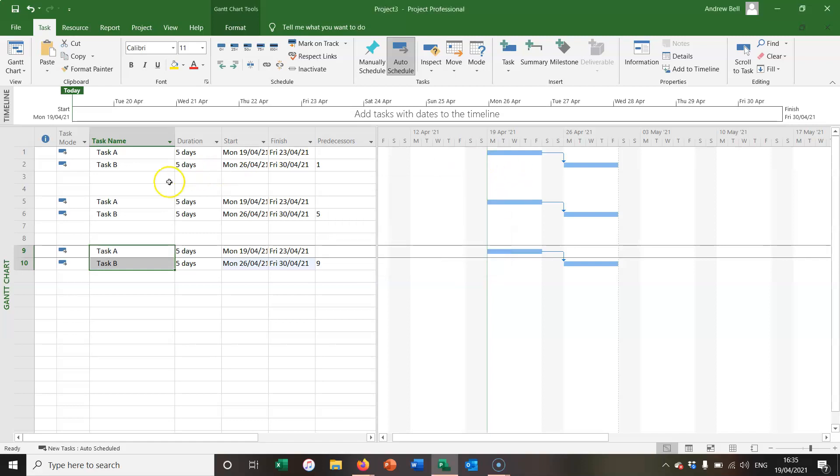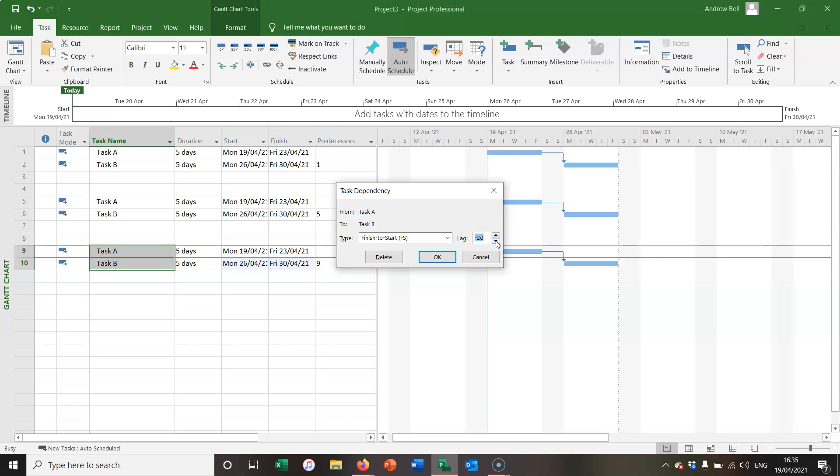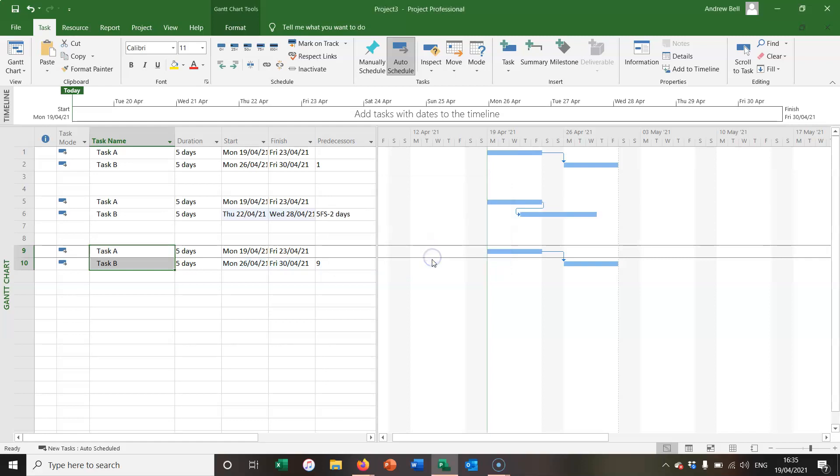So I'm going to leave the first one as the default position. And on the second one, I'm going to add two days of lead. Now two days of lead time is minus two days of lag. And now the second task can start two days before the first task has finished.